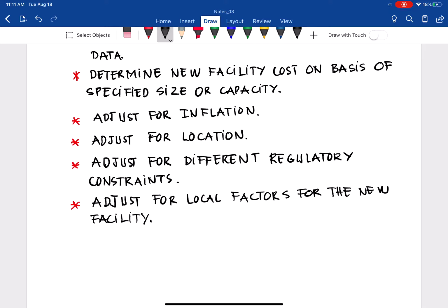Just like the EPA, Environmental Protection Agency, the requirements for the environment will increase over time to protect the environment. So with the regulatory change, the process and the cost involved for the project may increase to meet the new requirements from the regulators. Or not only the environment, it also applies to structures.